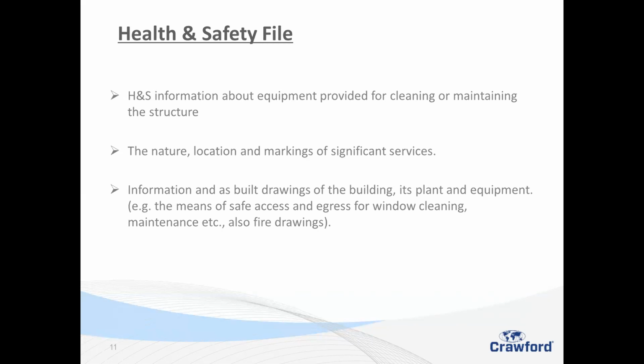We look for information such as any of the new drawings, plant and equipment that was used, safe escape and egress from maintaining problems. We find this on commercial premises mainly, where we've got these lovely architects who've created things and it's very hard to maintain, or using certain types of product that are hard to maintain or clean.